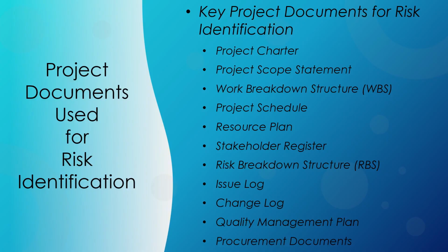Procurement documents detail the project's procurement processes, vendor contracts, and sourcing strategies. They provide information about external resources and third-party involvement. By reviewing procurement documents, project managers can identify risks related to vendor performance, contract compliance, and supply chain disruptions.